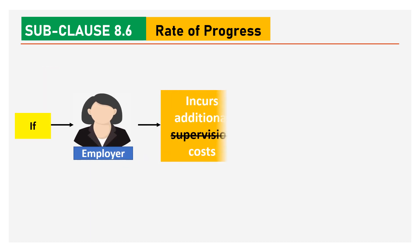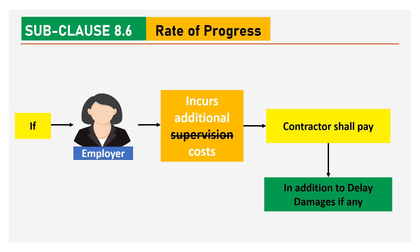The contractor shall adopt the revised method at the risk and cost of the contractor. If the employer incurs additional cost — note that the word 'supervision' has been deleted — the contractor shall pay the same to the employer in addition to the delay damages.